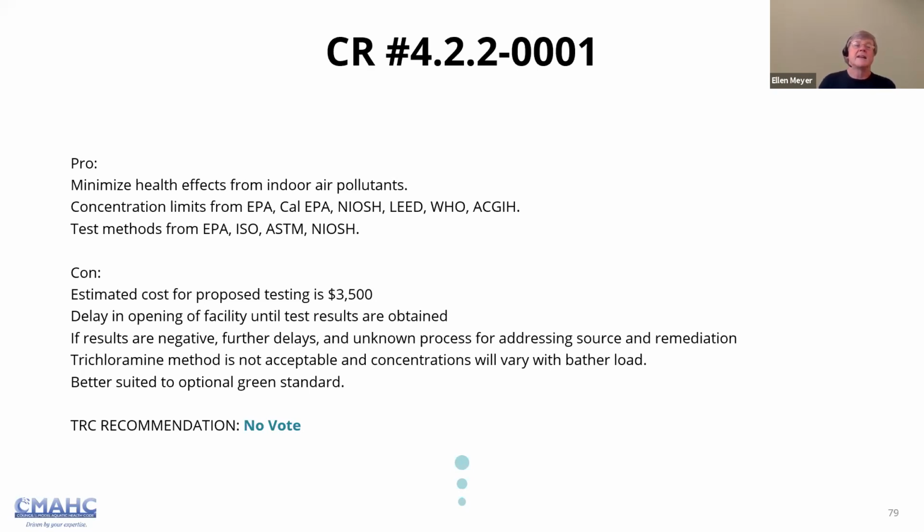And then there would be the delay in opening the facility until all your test results are obtained. And then if you don't pass any of them, then you would have to go back and remediate. And so that would result in further delays. And yeah, like we all know, time is money.